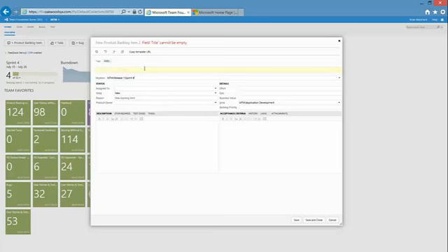So what I could do here is give it a nice short title, and that short title might be something like, I don't know, let's say we're going to create enhanced logging views. And that would just be a title that would make it really easy to see in a long list of stuff so that we can identify it very quickly. And then one of the ways we like to use this particular Scrum template is to go through in our descriptions, and we would describe our user story. So as an ops person on my staff, I need the ability to drill down into log entries a little deeper to get correlating information so that I can rapidly diagnose some kind of issue. Okay, and we'll actually show you good tools for that too. Let's not type all that, Chris. For now, let's just put in something along the lines of do stuff.